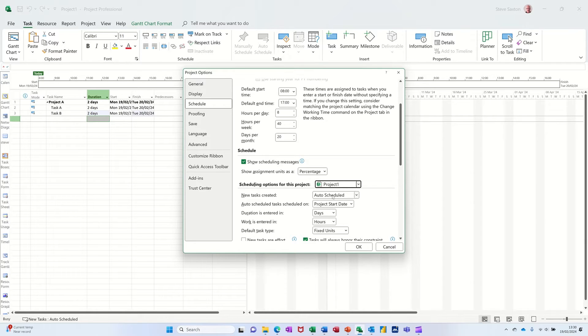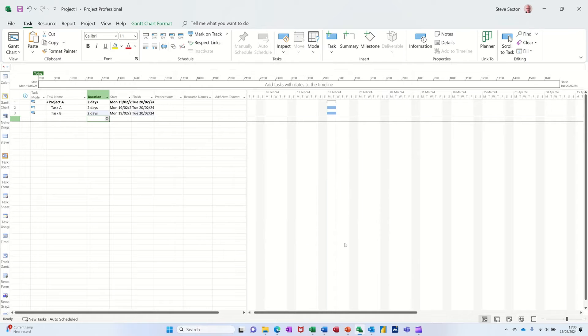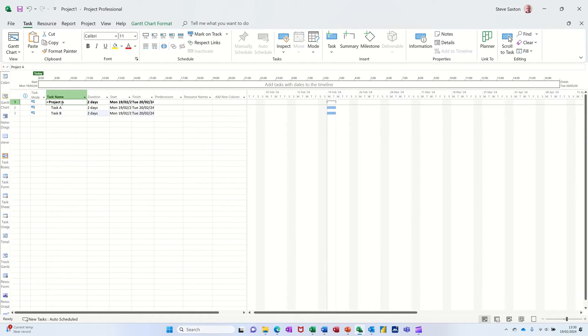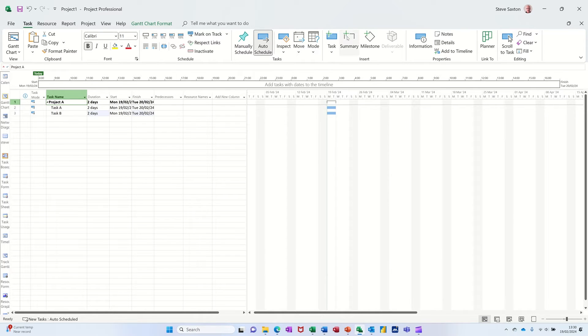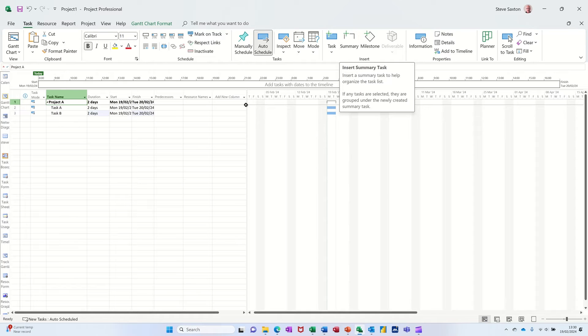Now that is not the default, the default is manually scheduled, and I'll tell you why I don't like that. This is a summary task - the fact I've indented it makes it a summary task. You've also got an option to use this little feature here, summary task.